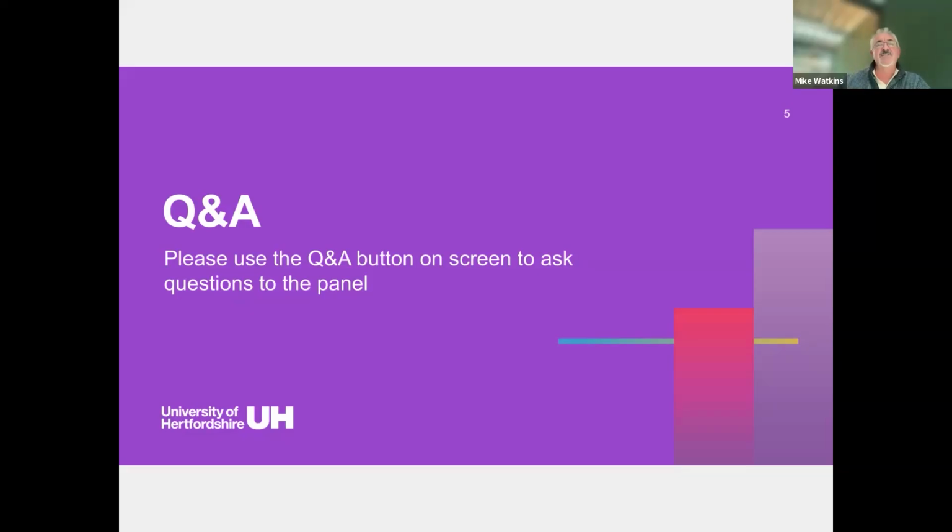Part of it really is looking at what outcomes they need to deliver, and maybe working backwards to think about, well, I need to deliver this by this date. How long do I think it will take me to do it? And then I always advise my students, there's a law called Hofstadter's law, which basically says it's always going to take more time than you expect it to take. So as a rule of thumb, I tend to times it by 2. And even that is probably understating it. So maybe times by 2.5 or times by 3.